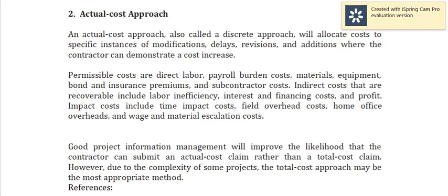Right? So, good project information management will improve the likelihood that the contractor can submit an actual cost claim rather than a total cost claim. However, due to the complexity of some projects, the total cost approach may be the most appropriate method. So, sabi dito, yung total cost approach may be the most appropriate method. Pero as much as possible, syempre, mas maganda yung actual cost approach.